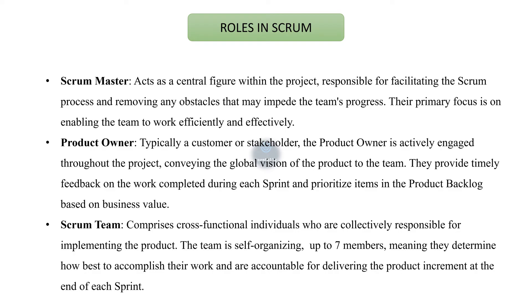The third role is the Scrum Team, which comprises cross-functional individuals who are collectively responsible for implementing the product. The team is self-organizing, with up to seven members, meaning they determine how best to accomplish their work and are accountable for delivering the product increment at the end of the sprint.